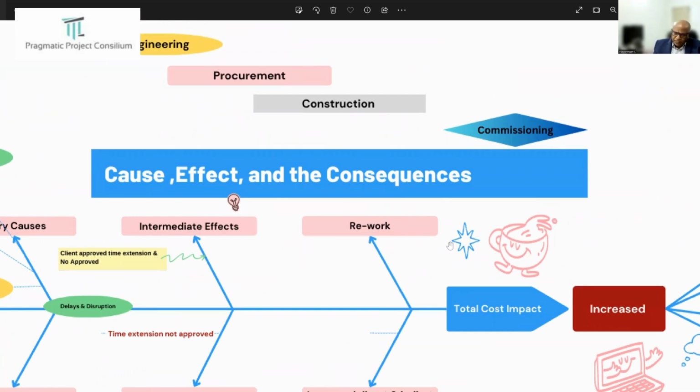Now, coming to schedule assurance, which is very important. Many project schedules are poorly prepared and need to be rebaselined during project execution to become useful project management tools to properly measure progress. For example, there are change orders and a lot of changes happening even though you have submitted the original approved baseline, and again we face some changes, and therefore we have to keep revising the baseline, and accordingly watch the critical moments.